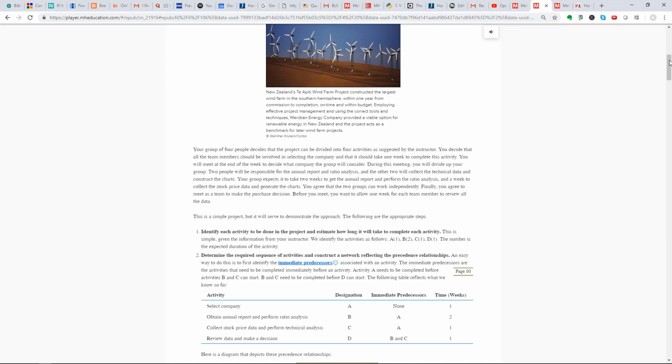All right, so we select a company, we perform 2 different kinds of analysis on it, and then we come together at the end and we review both and we make a decision on what company we're going to invest in. So we designate the first process as A, then we have B and C in parallel, and then D. We finish on D. Now, B and C depend on A. It says so right here. The immediate predecessors, the dependency: A has nothing, no preceding activity, that's at the beginning. B depends on A. C depends on A. So A is the predecessor to B and C, and then B and C are both predecessors to D.